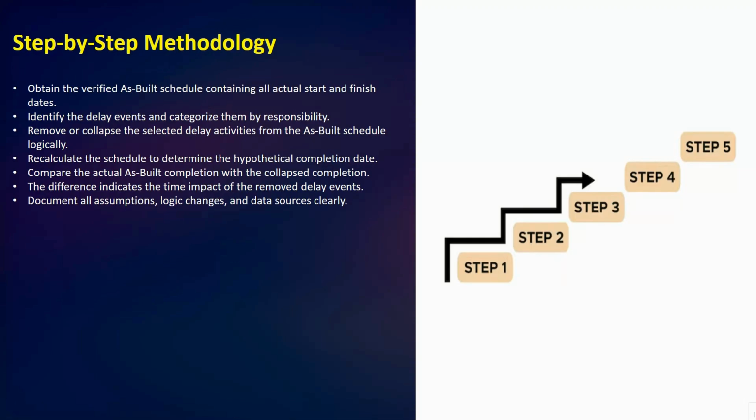So we will compare the hypothetical but-for completion date with the actual project completion date to measure the total time impact of the removed delays. This reveals how much each delay contributed to the overall project delay. Next, the difference indicates the time impact of the removed delay events.